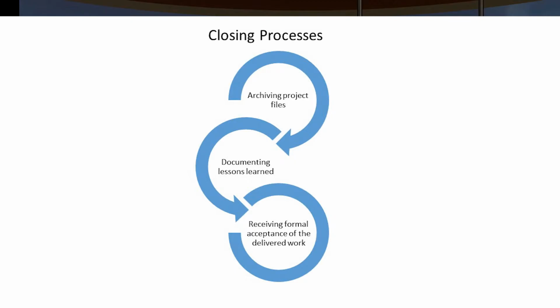Some of the closing activities include archiving project files, documenting lessons learned, and receiving formal acceptance of the delivered work. When the project comes to an end, some key outcomes are the formal acceptance of the work, creation of closing documents, and organizational process asset updates.